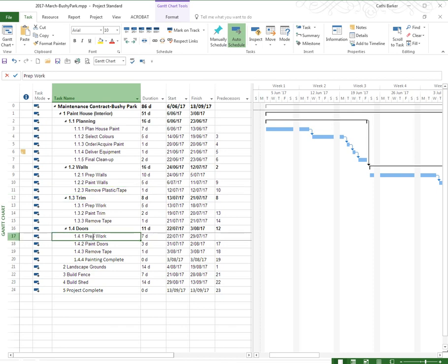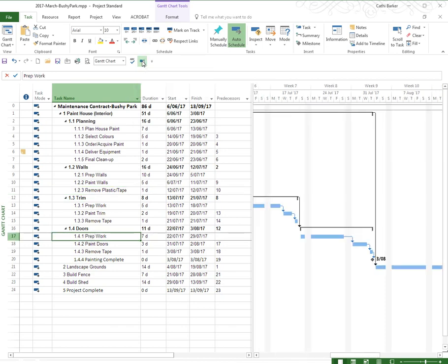I'm going to click on row 17 and I'm going to scroll to task, which is a button we added to the quick access toolbar in an earlier video, which normally resides here to the right of the task tab in the ribbon. But why I've scrolled to task is I think this is a good candidate to illustrate what the different types of relationships are. Row 18 is linked to row 17 and the number 17 appears in the predecessor column, which means that that's a finish-start relationship. But let's say there's no reason why these 2 tasks, for example, can't start at the same time. Don't look at what they are. I'm more interested in what the relationships look like.